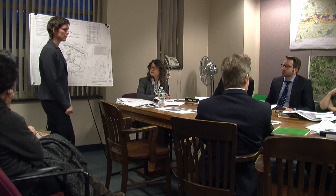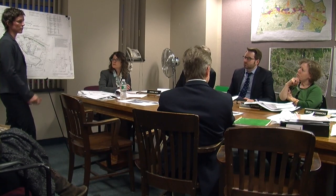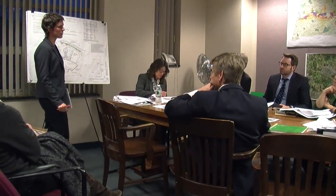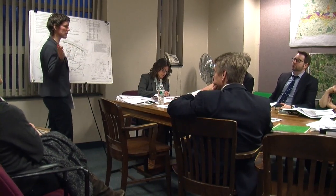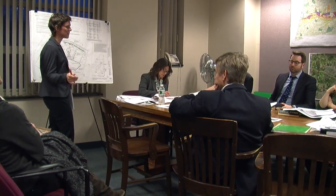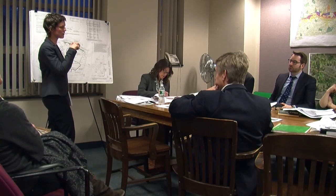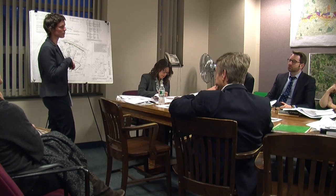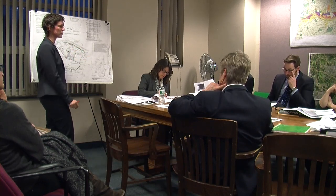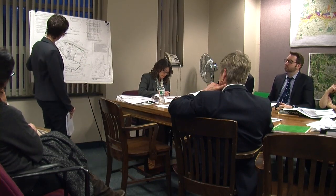Okay. Katja, you also said you're going to be out there to field locate. Yes, I want to approve. Once things have arrived, I want to make sure they're all in good condition. And then once they're laid out, I want to make sure they're in the right spots, probably before they dig the holes, so they don't have to dig the holes twice. Maybe stake them in with the annotations so I can tell where they intend to put things, and I can tell if it's the right spot for buffering and screening. So you can make sure you maximize. Yeah. Screening as much as possible.